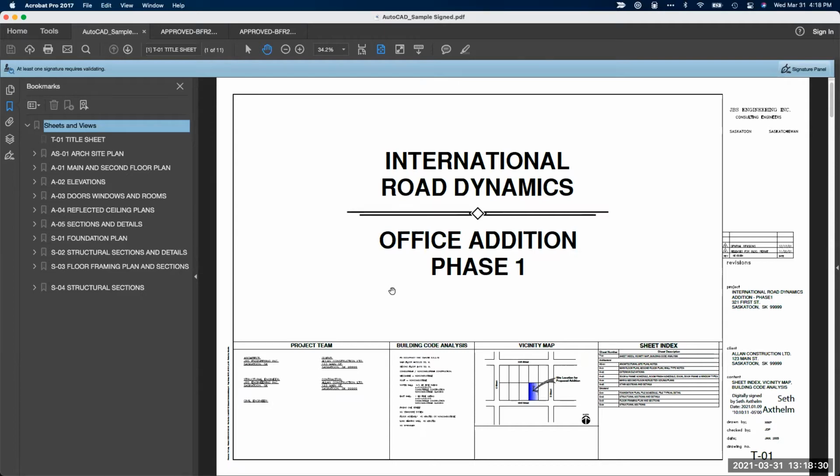And what that means is, for example, if you submit your initial set of plans and it's a 10-page plan set, it goes through its initial plan review, and plan reviewers only identified issues on 2 of the pages. You'll receive that feedback back from the city. And then when you're ready to resubmit any corrected sheets, you will only be required to submit the 2 sheets that had issues on them that have changed.